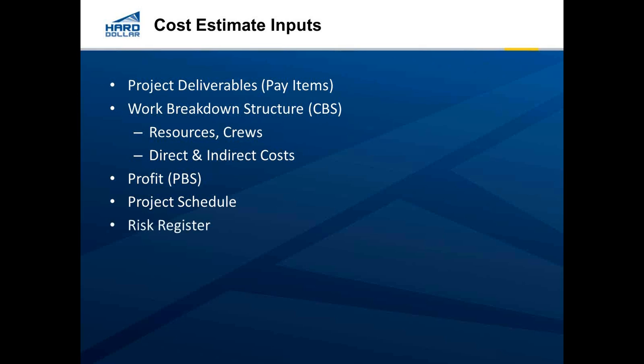We have been talking about risk, one of the biggest factors in a project. One important input is to make sure that there is some sort of a risk register. So as you're looking at your work breakdown structure, you're able to identify item by item what level of risk is that item. Is it low, medium, high? And you may even use some risk analysis kind of software that plugs in to allow you to be able to calculate that. That needs to be on the radar as you're putting the estimate together so that extra dollars can be allocated for some of those items.